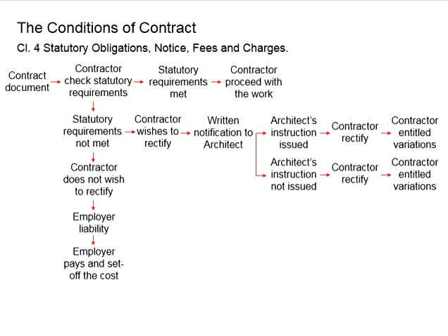This is because the owner of the project is the employer. The regulating body will seek the employer. There will be penalties imposed onto the employer, and this is due to the ignorance of the contractor. The employer should be entitled to set off the costs. Whichever penalties are imposed onto the employer will eventually go to the contractor. It is the obligation of the contractor to be competent in terms of the statutory requirements,